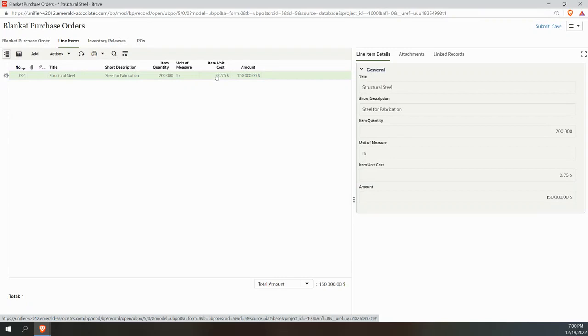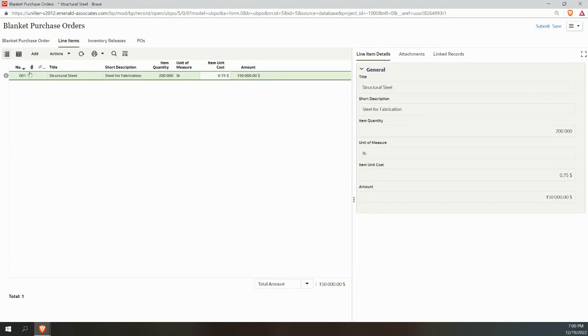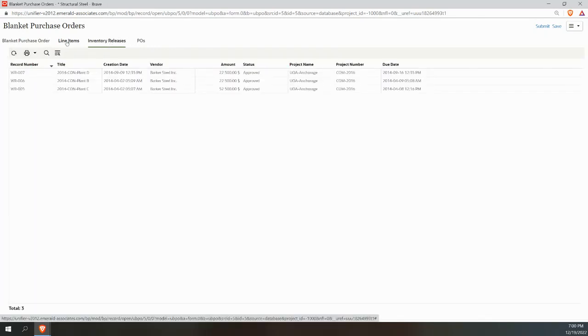We've got a unit rate, and that could have come in through a bid process, or it could be sole source, depending on your criteria. And that is being purchased in bulk. Now, we might need to, at some point, release that to different projects. So this is how this would work. So plant B, plant C, plant D, and these will actually go into the project as a cost, okay?